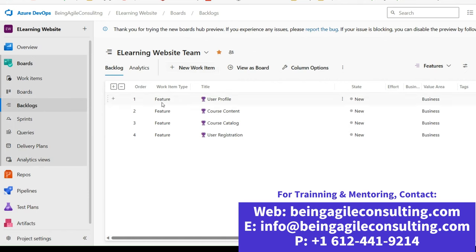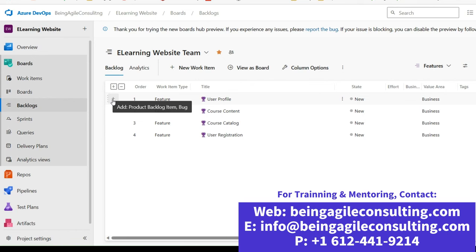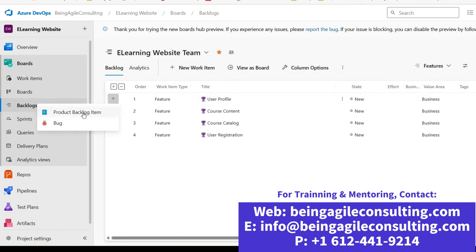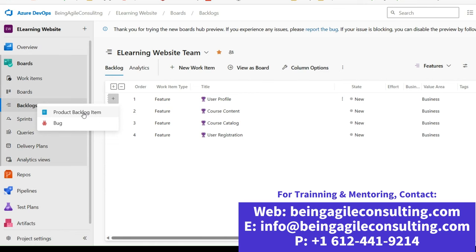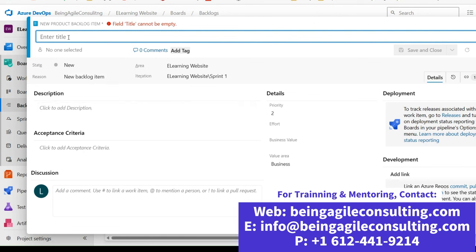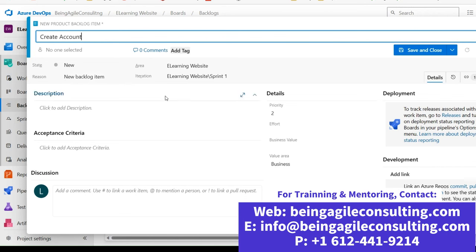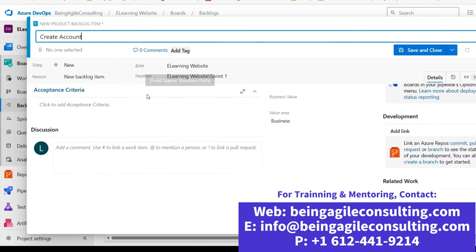Now I'd like to show you how to flesh these features out — I'm going to focus on one feature and create user stories for it, and also create tasks under those user stories. To create user stories for this feature, click this plus button here. It says Add Product Backlog Items. Click on it and select Product Backlog Item. The title of the first user story under the user profile feature will be Create Account. This is how you generate the user story: you put the title, and then you assign whoever will be working on it using the person icon.